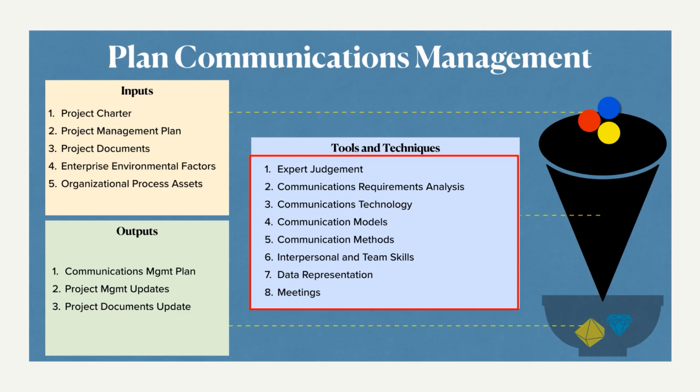The communication requirements analysis, right? This is something new to learn. It says analysis. What are we analyzing here? The information needs of the stakeholders in the project. What we do is first identify the void, or the need for information. We identify, okay, here we need some information to be given to a particular stakeholder. And then we also identify the source of this information, who can support with this void. Such an analysis is the communication requirements analysis.